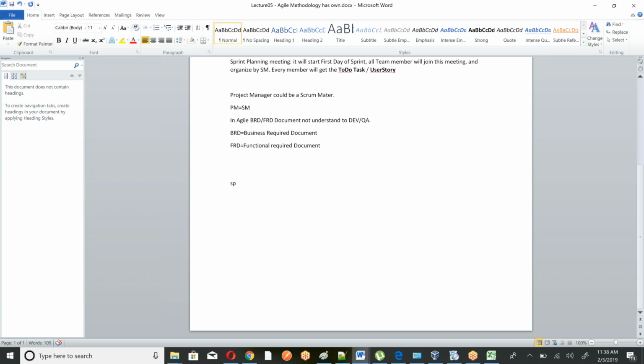Yes, for sprint one, suppose you have 5 developers, and each developer gets 3 user stories. How many user stories will go per sprint? 15. So suppose when they start, they have 200 user stories, and one sprint is going to be 15. But I'm saying it on average.